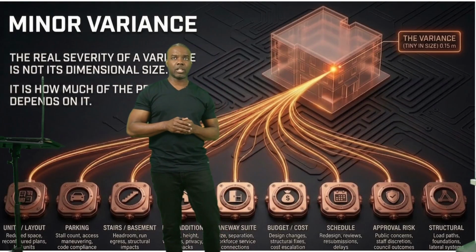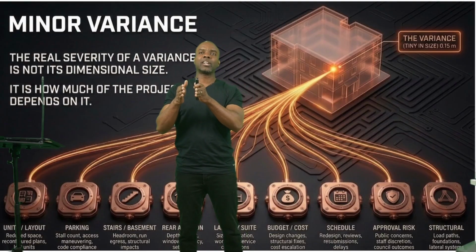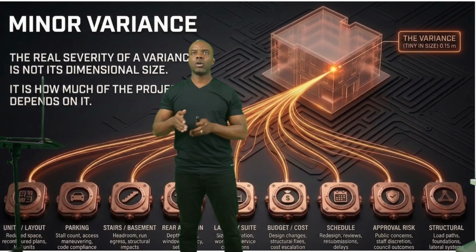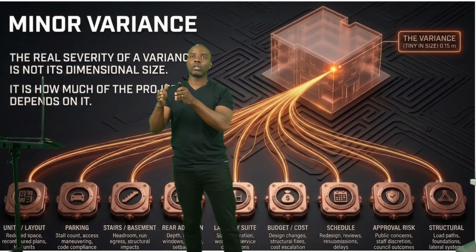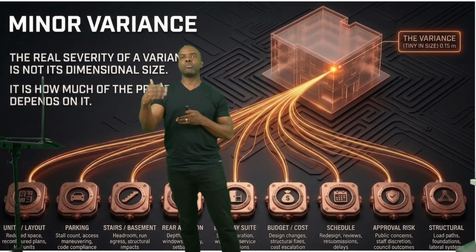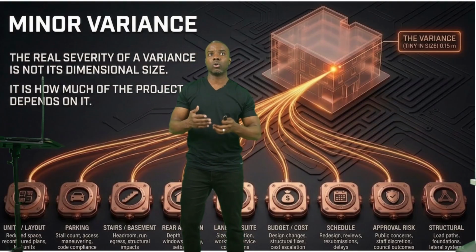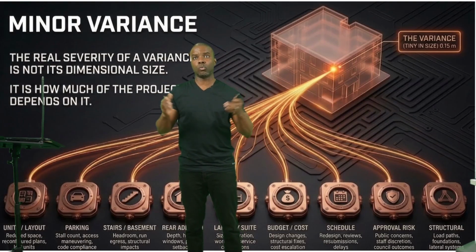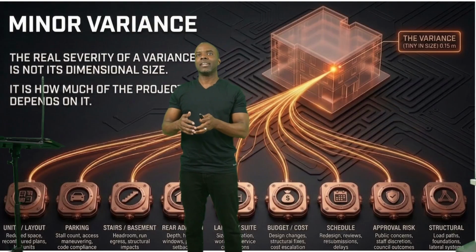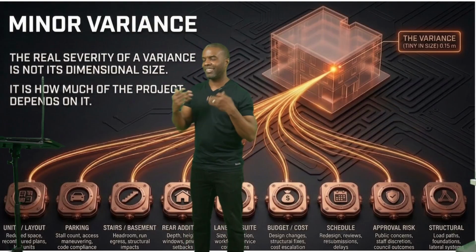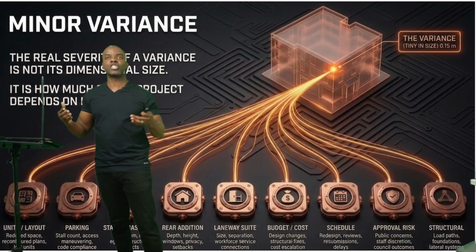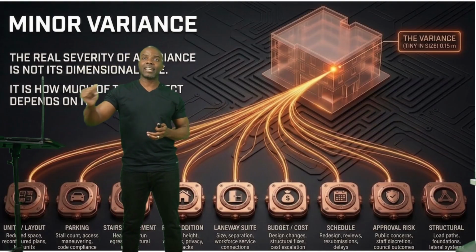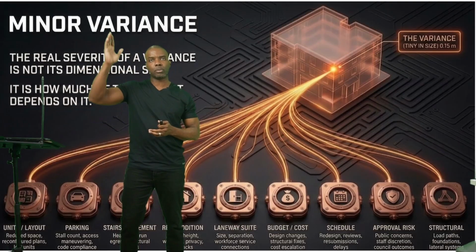What was the challenge that occurred? That one move triggered multiple different variances, or deviations from the provisions of the zoning bylaw. And that's where the problem occurred. Because we were planning to move that wall, we demolished more than 50% of what are called the main walls of the building, the supporting walls. Those walls removed the building from the status of being a legal, lawful building. Now it's called new construction. So we now had to figure out side yard setbacks, new provisions, and a slew of them.